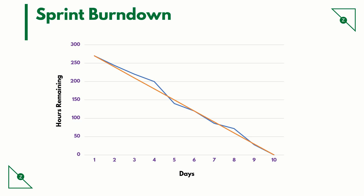And on day 5, you notice that the blue line has a steep curve running downwards past the orange line. This means that the team tried to catch up with the lagging time and they are now ahead of schedule. The blue line continues to be slightly zigzagged, and by the time the sprint ends, they have burned down the complete work.